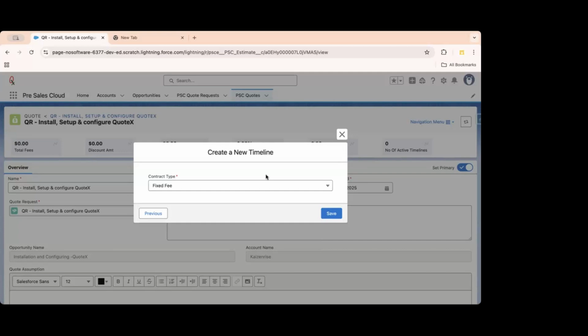There is not much risk, unless there is another component that you need to add as a contingency budget, in case one of the resources leaves and you have to hire another one. That's a contingency budget. This is other cost, but you don't want to add a fixed fee buffer on it, right? So in that case we take T&M.